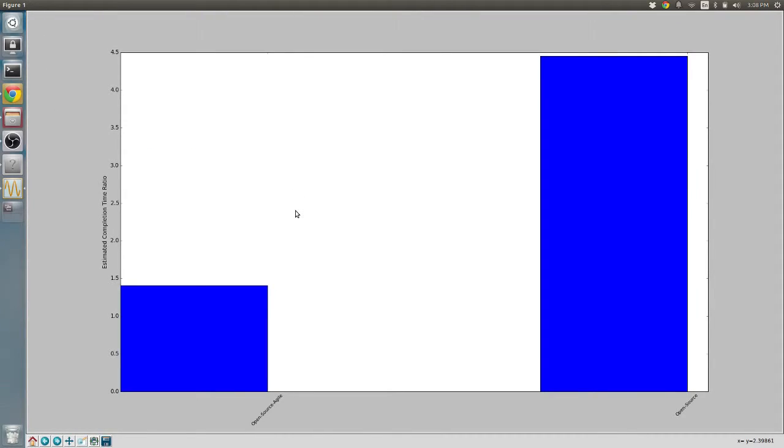Let's go ahead and expand this window and break down what we're looking at again. So we have this open source agile label, and we have this open source label. If you can remember, the Sonar project had this open source agile label we put on it, and the DS project had this open source label we put on it. So what these values are is every due date we took a look at and the completion time we had divided by each other. So if we have a 1-to-1 ratio, the value is 1, that means that we completed every issue for when it was planned.